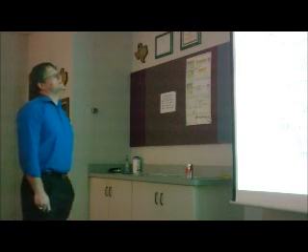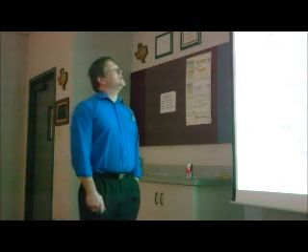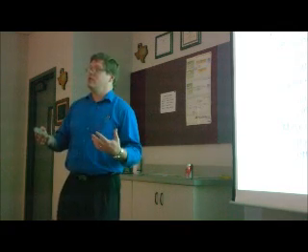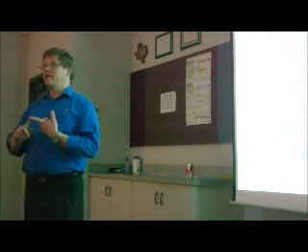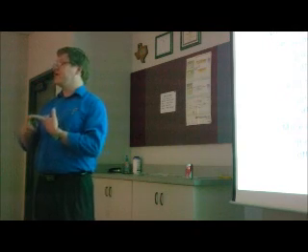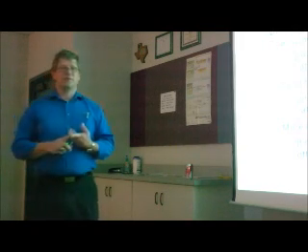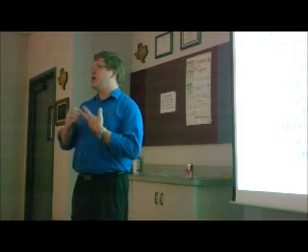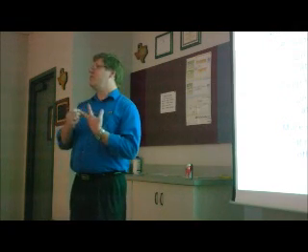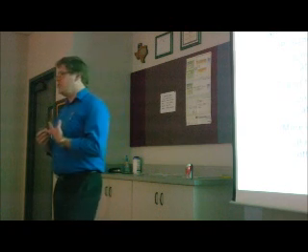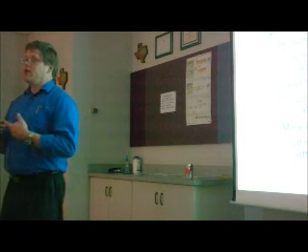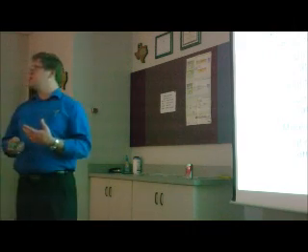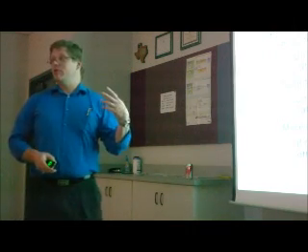Vendor selection process. Evaluate the submitted proposals against specific criteria. You want to have that criteria down up front. You want to know what's the most important: how quickly they can get back with you, how quickly they can implement a possible solution, cost. Maybe you want to weight these various things. Maybe cost is a really big deal, so that's 40% of your weighting criteria. The time, maybe that's less important. It's only worth 10%. And then your various other criteria. You want to have those in place before you ever start this.